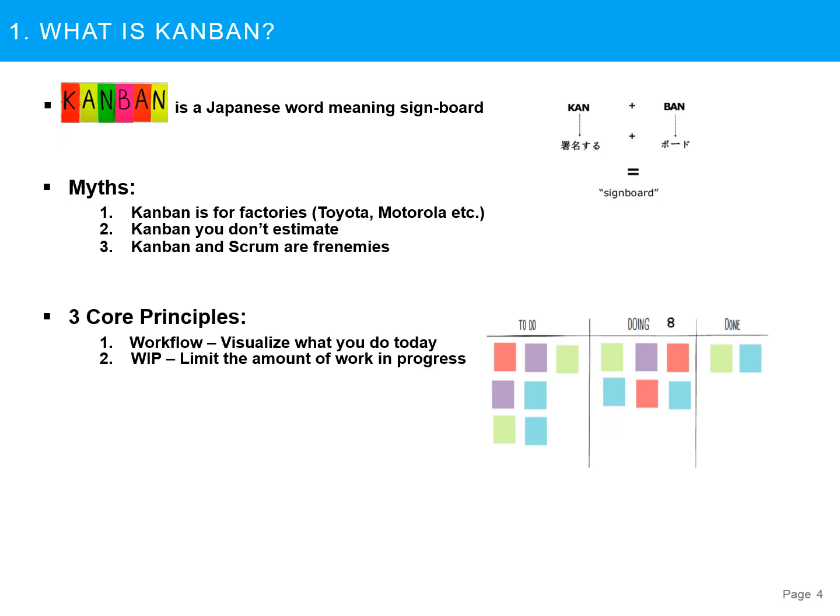So in this case, we've defined a limit of 8 story cards for this Kanban board. So we cannot have more than 8 items at any given time in this column.